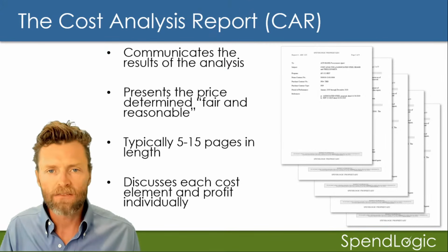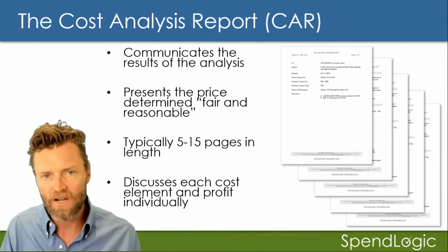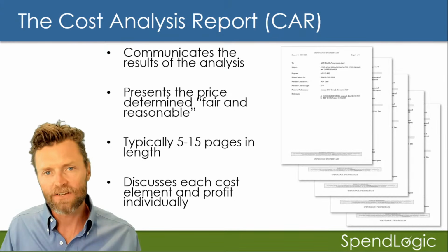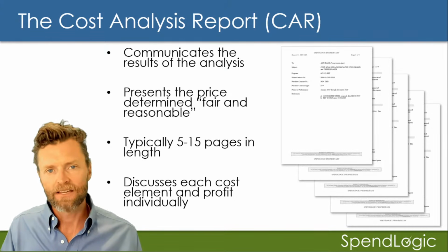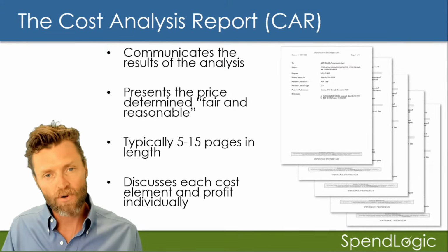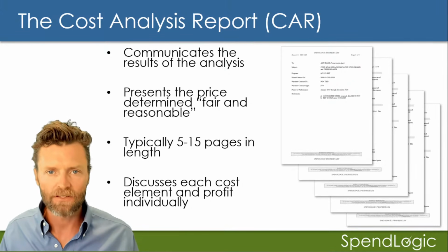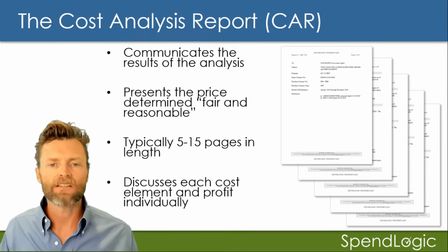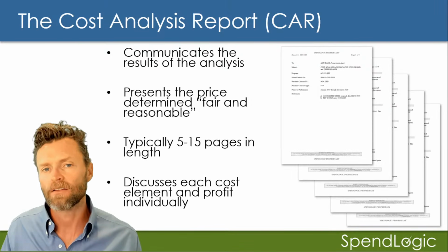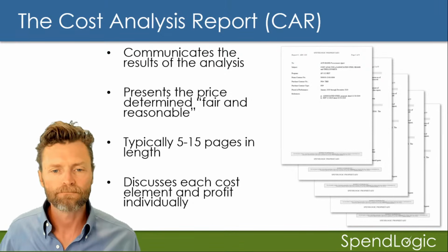Again, many of you are already familiar with cost versus price analysis. The biggest difference is that cost analysis gets into cost elements and profit, whereas price analysis is really just focused on the top level. So in a cost analysis, you're actually going to get into a position on profit as well.